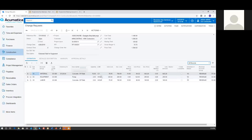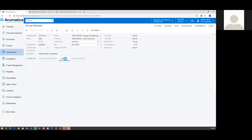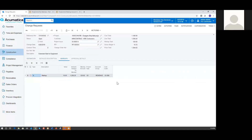We can customize the look and feel simply by clicking on the column configuration button, picking and choosing which columns we want to show or hide. If I click on the Markups tab within change requests, I've added an additional 10% markup onto the change request — showing the amount subject to that markup, the markup amount, the project task associated with it on the Eastgate strip mall project, the account group, and my cost code. Cost codes are really important in the Construction Edition — it's how contractors create the details of their budgets, both cost and revenue, and how they utilize WBS codes or work breakdown structures, tasks, activities, and phases to break out, bill, estimate, and budget for their particular project.